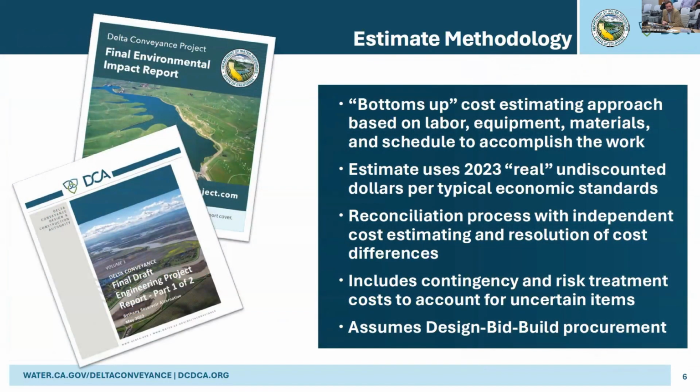So in terms of our methodology, we did use what we often call a bottoms-up cost estimating approach. That's for the primary or really the main effort of the estimate was developed that way. In essence, what it means is we're taking into account consideration of the schedule, the equipment, the labor. So we're really building our way up to an estimate at this stage, what is approximately a 10% stage. That's not always the case. That wasn't the approach back in 2020. That level of information was not available to provide that type of approach. But we have the information. We've been working on it and developed this estimate from the ground up. So that's really thinking through those individual aspects of performing the work.